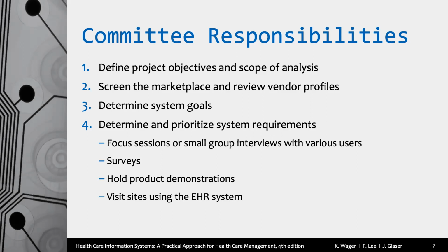So from that point on, lesson learned, I would make whoever was in charge of the project on the hospital side sign off and say, we will agree this project is done when the following has been met. And we also agree that that's the last milestone of the project and that you will cut payment to my organization.